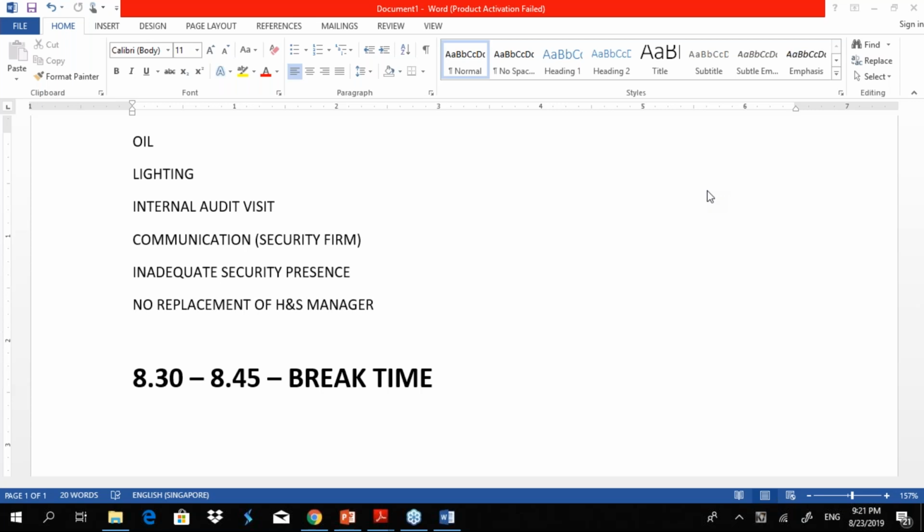So the recommendation would be there should be clear instructions to staff about health and safety in all sites. And also a recommendation on regular inspections, which should be recorded so that anyone who wants to see whether it was done can go through it. Who monitored or who inspected? Were there any shortfalls? How was it remedied? Were any accidents reported? And so on. So that would be your recommendation.